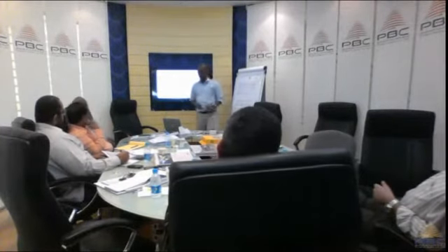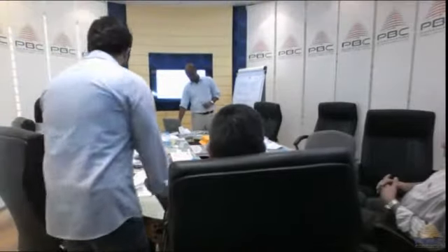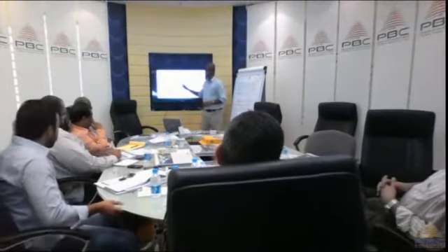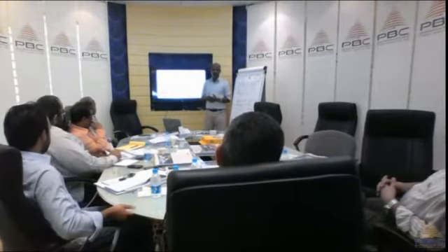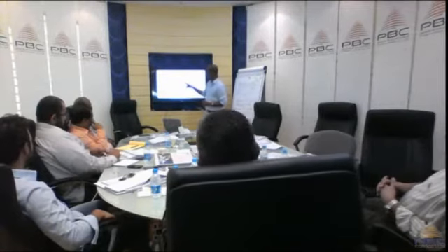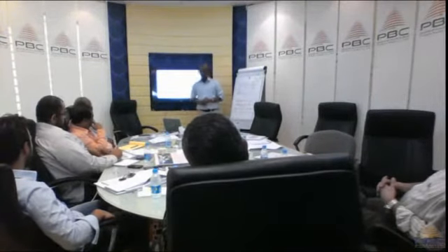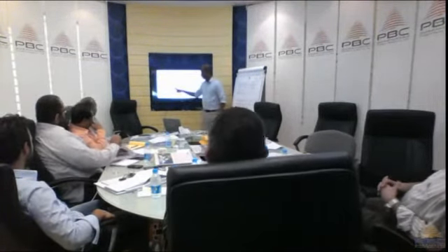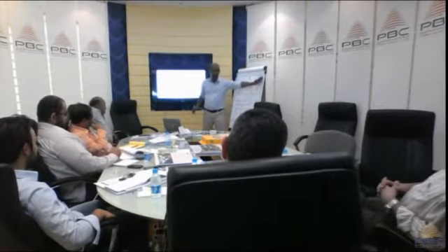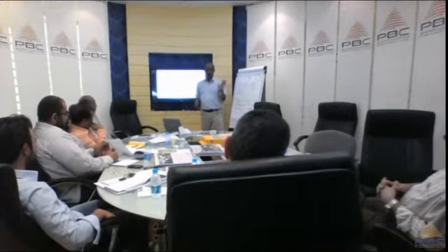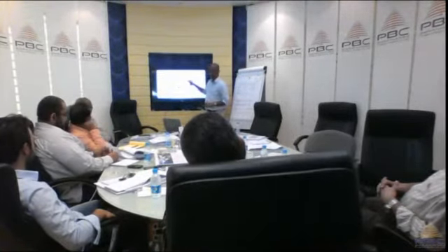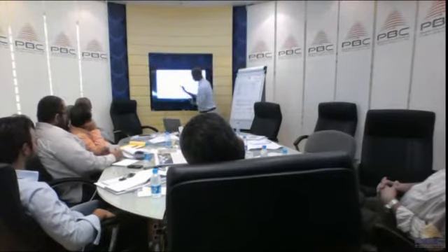Now let's look into another one. This is your final report using the earned value technique. The solid line is your planned value. Why can we plot the planned value from A to Z? Because we know how long the project will take and what the value of each day is. So this is my reference point. Alongside that, as I go, I plot my earned value and my actual cost.